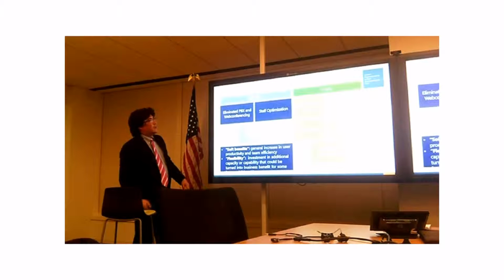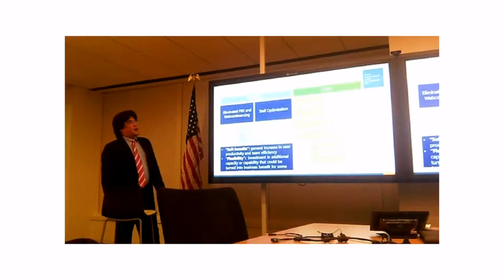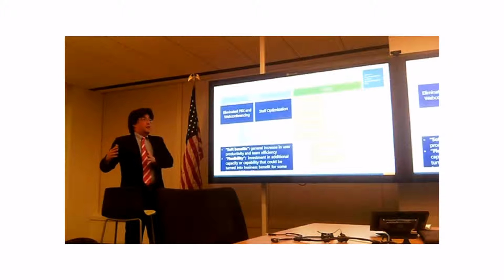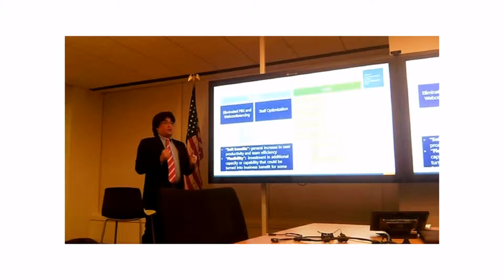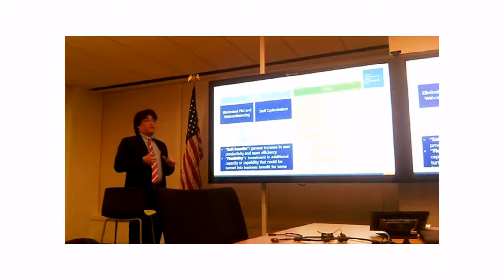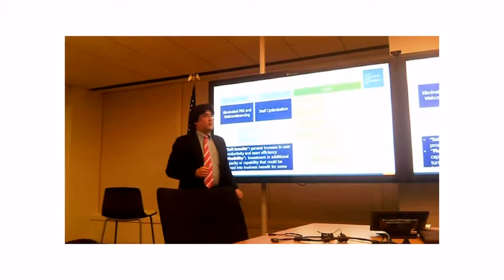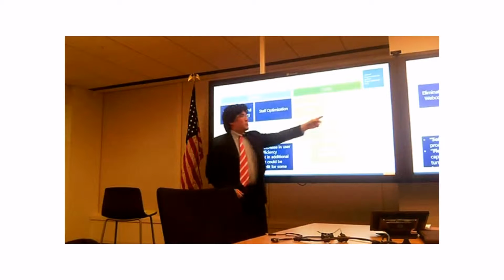Can you help me understand the difference between implementation, labor, and professional costs? Sure. So implementation labor makes the assumption that the implementation is done with a ratio of this many people from our internal group is going to be responsible, along with maybe 20% of contractors. So depending on the organization, some have a 30-70 breakdown, some a 50-50, some are all doing it with professional services. So that's really the difference, is that this is internal, this is external. Oh, okay, got it, thank you. Yeah. And this also includes the training. Okay.